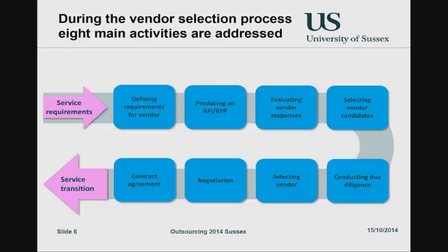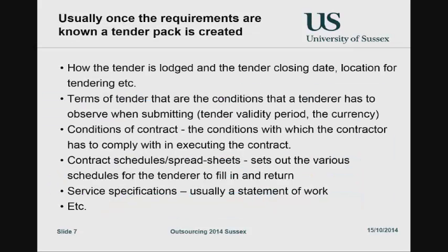Okay? Oh, God, yes. Yes, memorandum of understanding. When the requirements are known, the tender pack is created. How the tender is lodged, so there are lots of formalities, it's not so important, but I'll just mention them. Where it's going to be lodged, the tender closing date, location for tendering, all that.